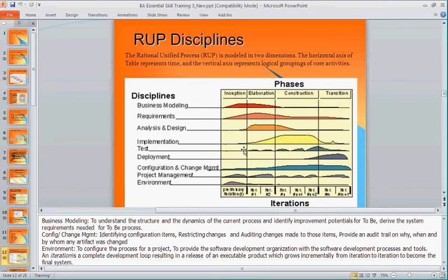So you are getting those time and cost estimates from your design and development team, right? So that you can build your timeline and your budget. Same goes for the testing team. They will also review your requirements document and give you an estimate. Deployment team.